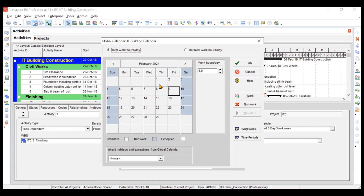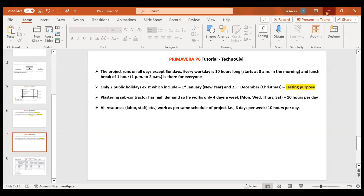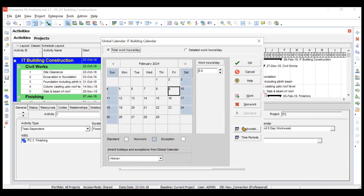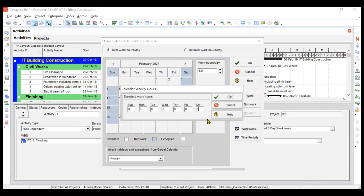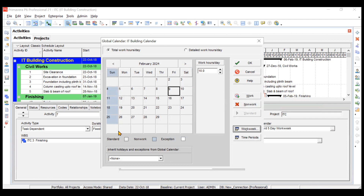The base calendar shows Saturday and Sunday off, with eight hours per day. But for our project, only Sunday is off and it's 10 hours long. First, change the work week: set Saturday to 10 hours, Friday to 10 hours, Thursday to 10 hours, Wednesday to 10 hours, Tuesday to 10 hours, and Monday to 10 hours, then click OK.